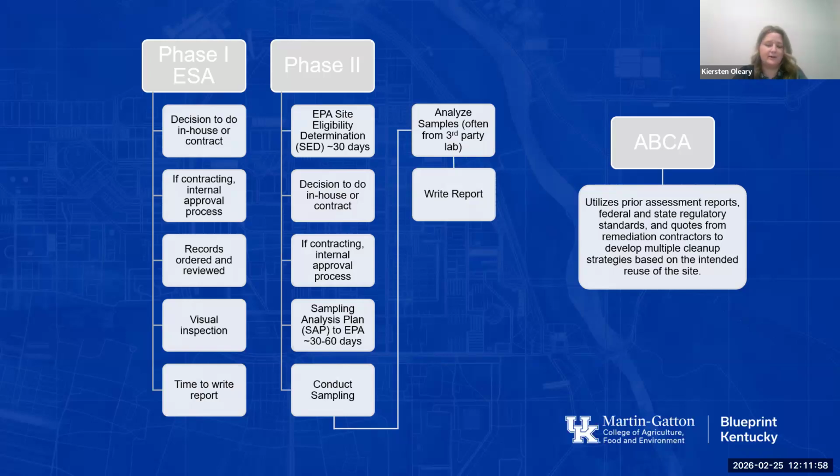And then one other thing I wanted to point out is that sometimes samples are being sent to a third-party lab. So if there's a high volume of samples being sent, that could cause some delays too, depending on their turnaround time for that analysis. So I just wanted to make you aware of all the steps that it takes to get to a final report when we're talking about these assessments.